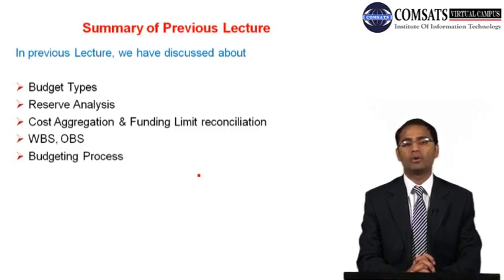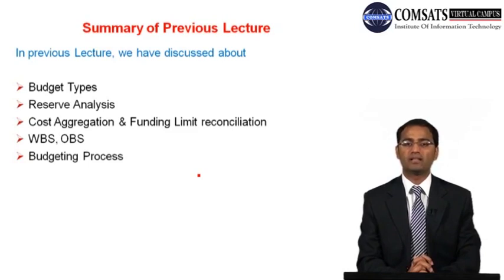And then we talked about how the contingency reserves are under the control of the project manager and team, whereas the management reserves are out of the control of the project manager and team, as they are beyond or outside the project organization, and are usually dealt with by the program manager.